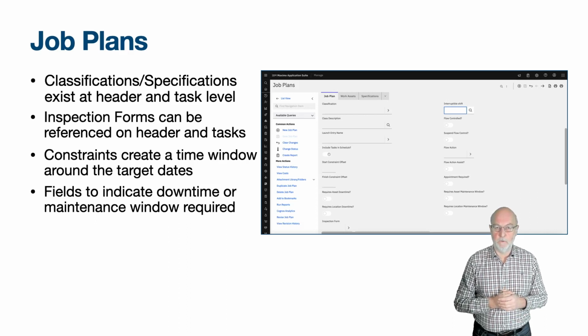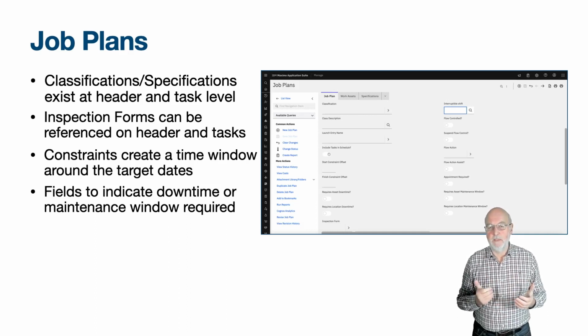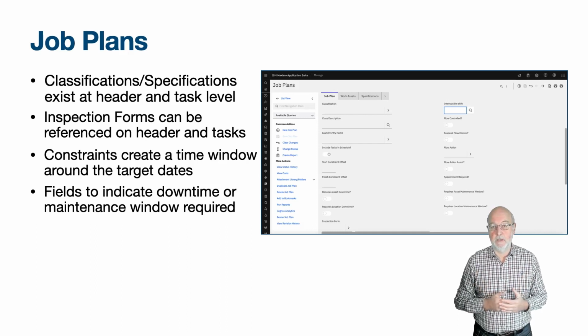Interruptible indicates that a work order can be started and then interrupted at shift end if it is not finished, rather than having to be continued by the next shift as one continuous job, non-interruptible. The interruptible shift field is used when interruptible is set and indicates a shift where a work assignment can start and then continue the next time that shift becomes available.